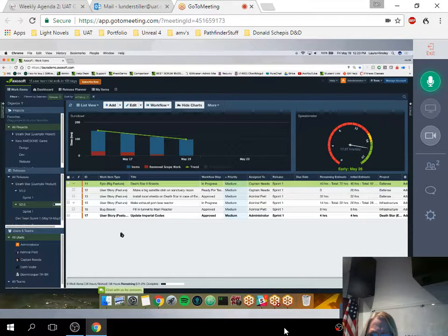So over the course of 2 days, I mean, I'm sure you're familiar just with calculating averages. We need 2 sets of data points. So over the course of 2 days, Axosoft will start to understand how you're working. And then you basically just need to tell the system how long it took you to complete one of these items, and you're able to start to get this nice velocity and understand, are you early or are you late for the work that's due in this week's team sprint.